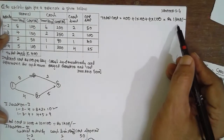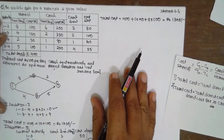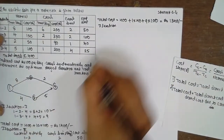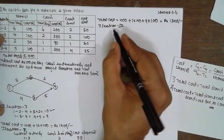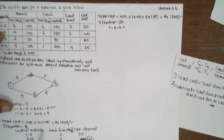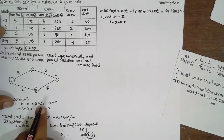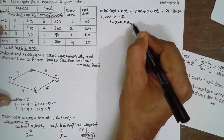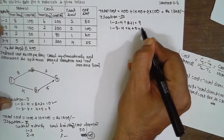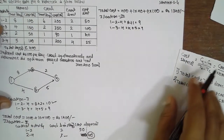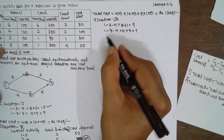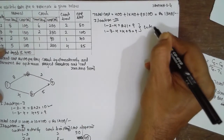The previous was 1400 and now 1340, which is lesser. So we go for one more iteration — iteration 3. For path 1-2-4: we have crushed activity 2-4 by 1, so replace 2 with 1, making it 8 plus 1 equals 9. Path 1-3-4 remains 9. There are now two critical paths.